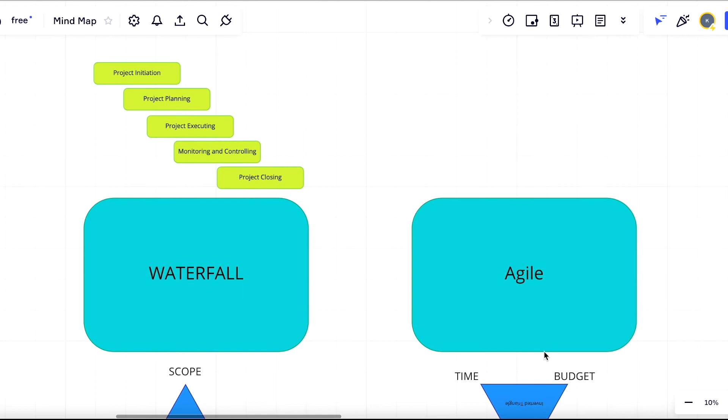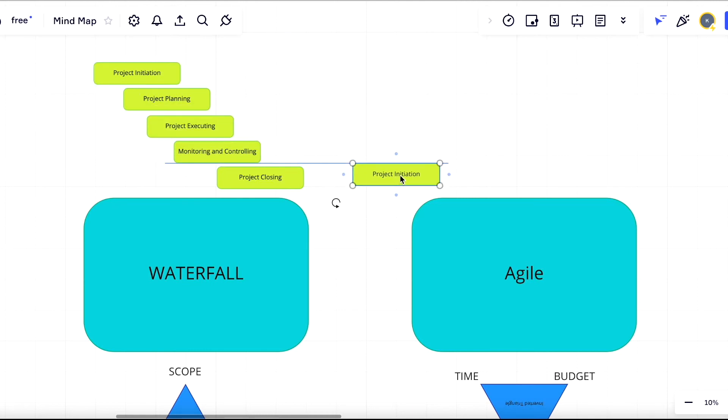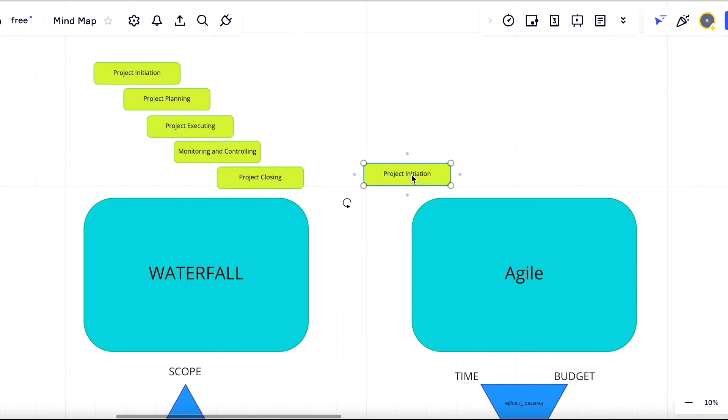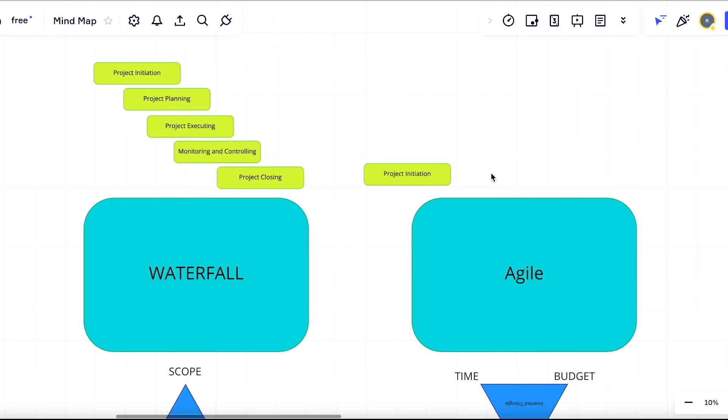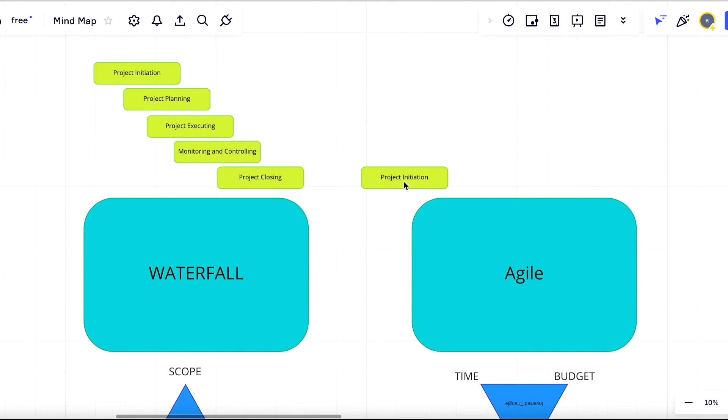What happens with the project management delivery steps? The key project management delivery steps are maintained the same, but how can we adopt them to agile so that we can deliver the project incrementally to get frequent feedback and adapt our scope to the project needs, updated goals, updated priorities, and deliver the better product eventually? First, we still start with project initiation. This is something we have to do in any case when getting started with the project, because during project initiation we understand what problem we are solving by delivering this scope of work. During project initiation we are understanding the basic project scope and what we are going to give to end users. If you heard about MVP, this is where we discover what the MVP features are going to be.